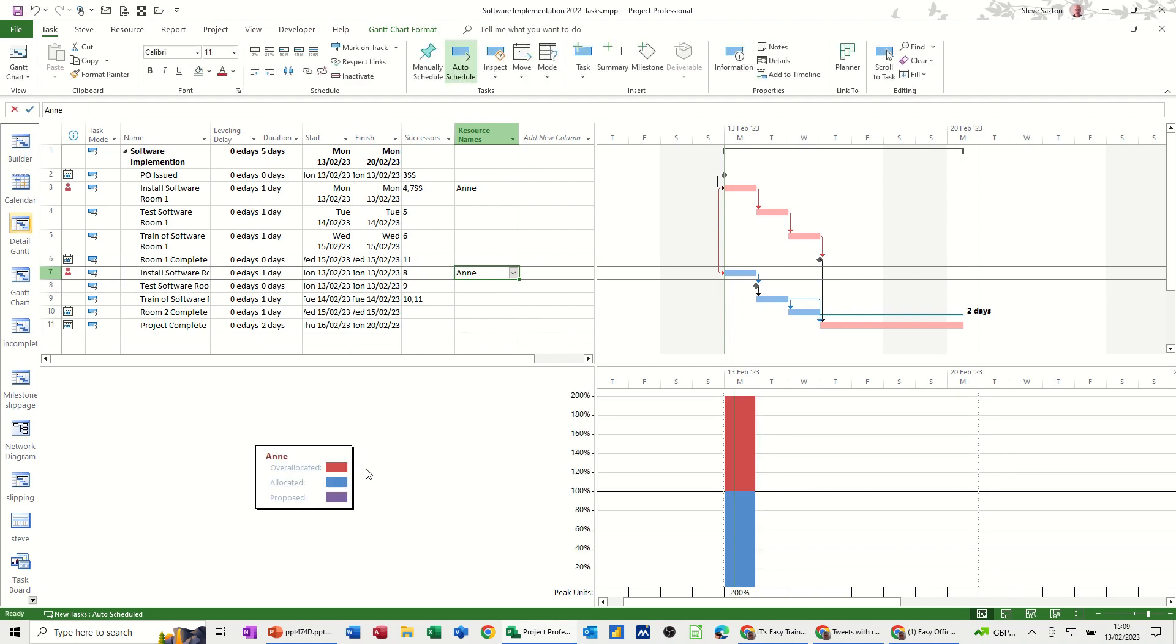There you go so this view is quite useful to show you where there is an over allocation of resources so you can see straight away that that day Anne is over allocated.